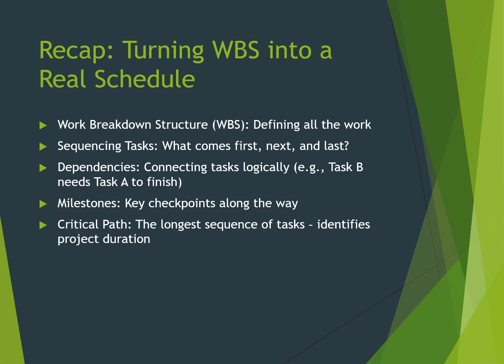We also identified milestones, which are those important checkpoints or significant accomplishments that mark progress throughout your project. And finally, we identified the critical path. This is super important because it's the longest sequence of tasks that determines the shortest possible project duration. Any delay to a task on the critical path means a delay to your entire project.